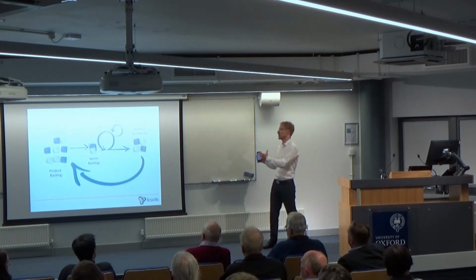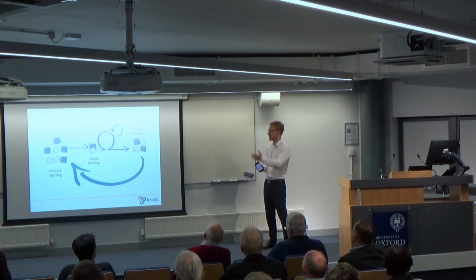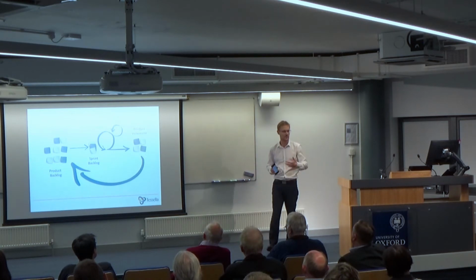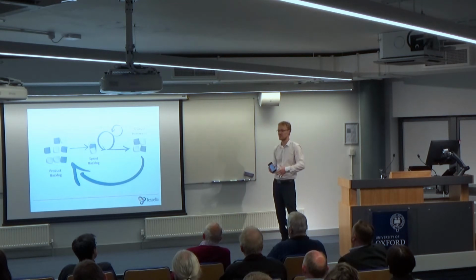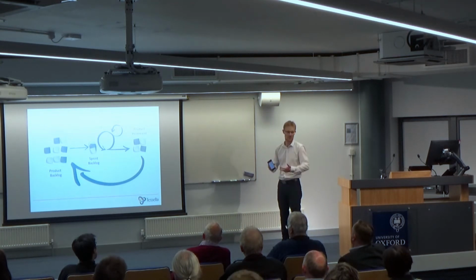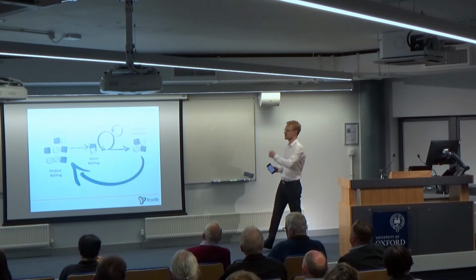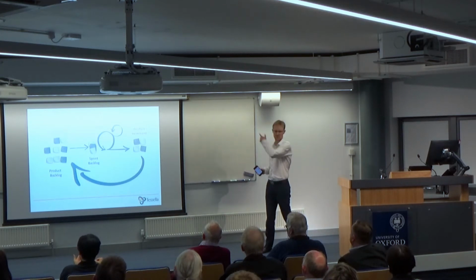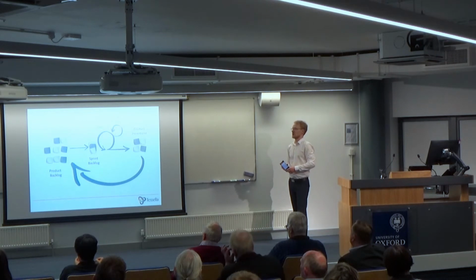Then you deliver the product with just those high priority features to the customer and you get them to use it. By using it, they'll give you some feedback. Is it working? Is it not working? Are there bugs? Was it the right product to build in the first place? You get feedback, you adjust your product backlog, you adjust your sprint backlog, and you do that again and again and again. That's the idea of Agile.